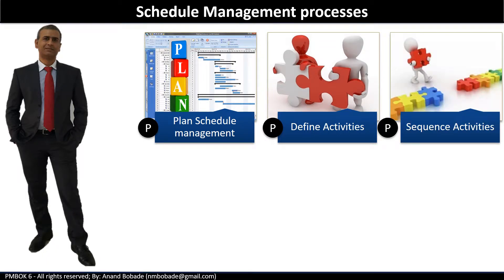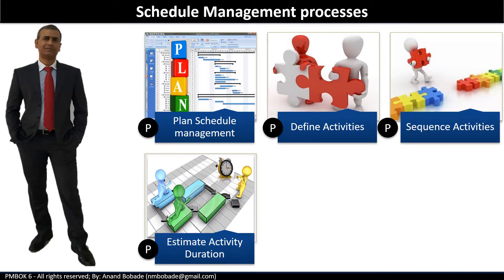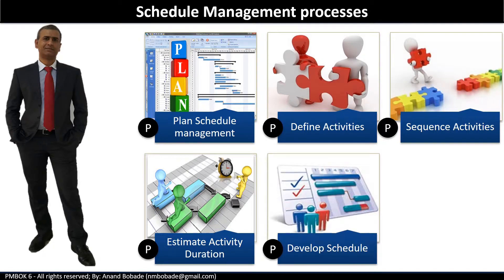Sequence activities, again under planning process group, is the process of identifying and documenting relationships among the project activities. Estimate activity duration, again under planning process group, is the process of estimating the number of work periods needed to complete individual activities. Develop schedule, under planning process group, is the process of analyzing activity sequences, duration, resource requirements, and schedule constraints to create the project schedule model.